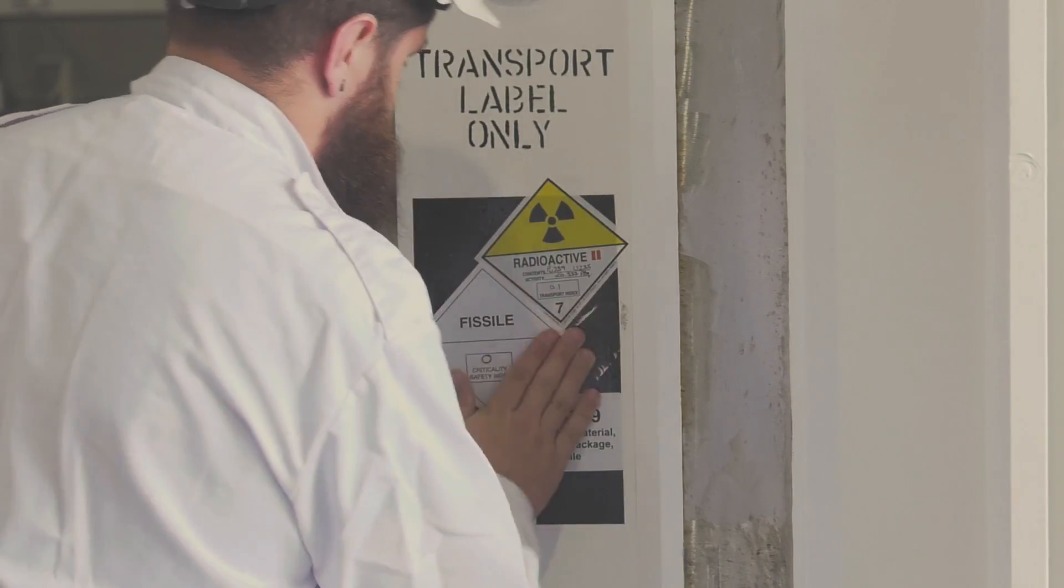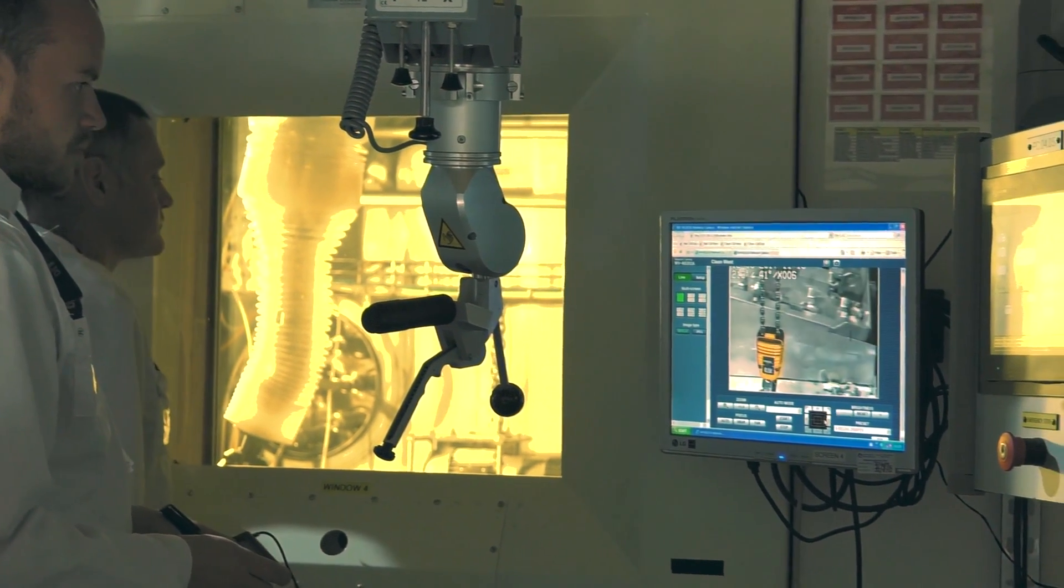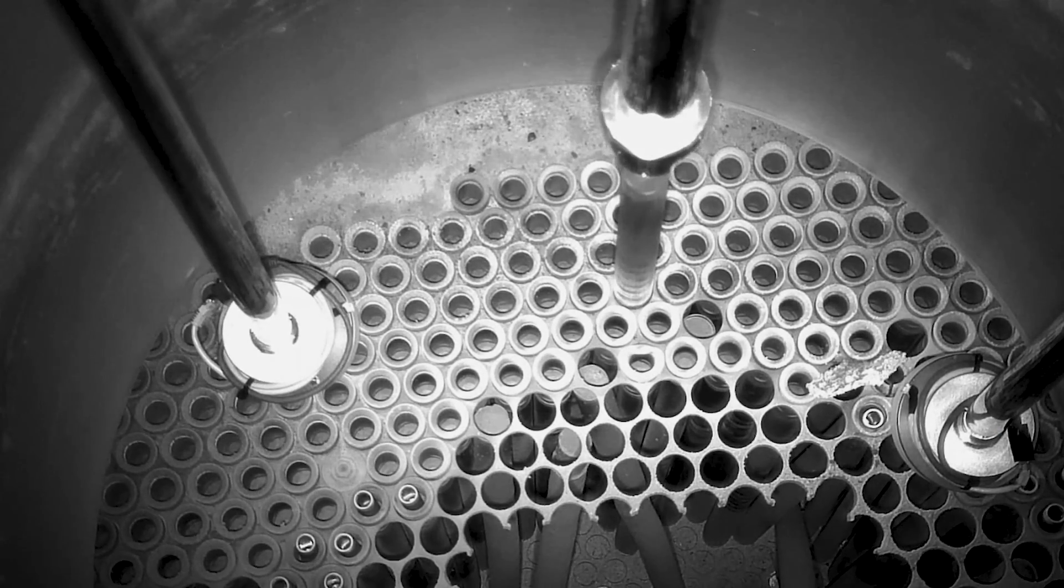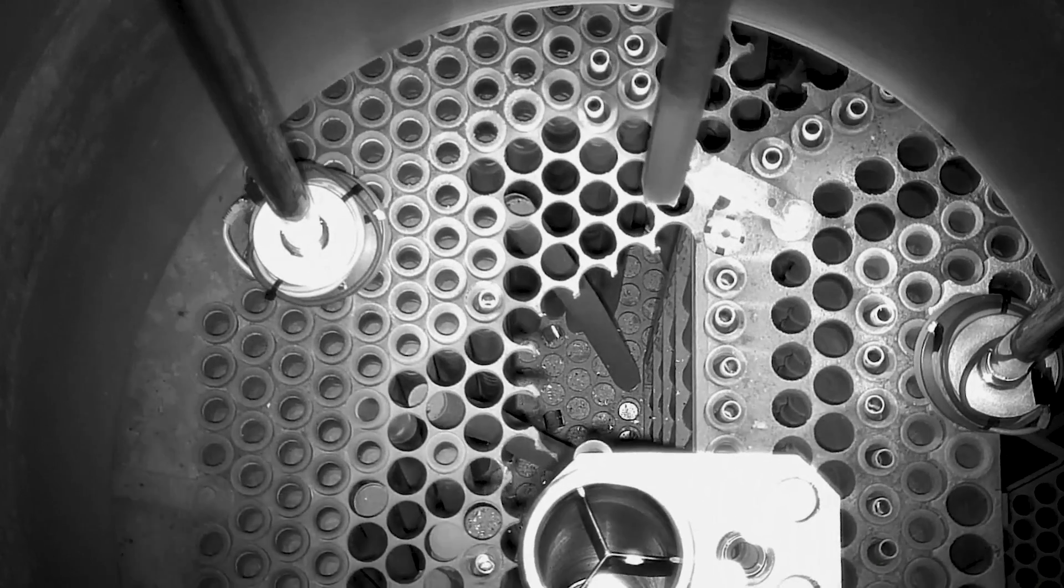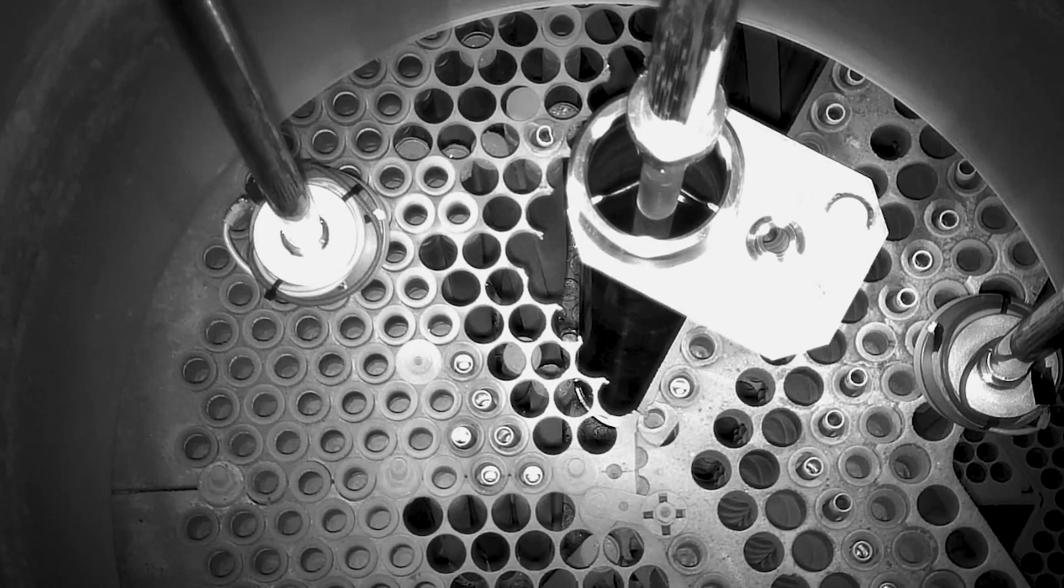Every element is different depending on where it's come from within the reactor. They've had different histories. Some of them have got different amounts of alkaline metal coolant on them and that creates a slightly different process that has to be tailored for each element depending on what we find.